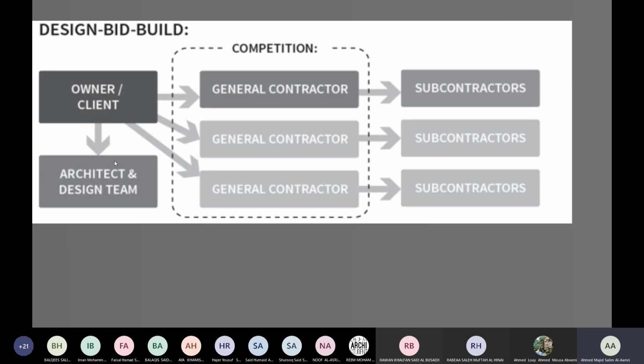The other person. So if I say I have signed an agreement for 50,000, I'm going to pay only 50,000. Whatever happens in the materials, whether the prices are going up or down, it's not my relationship. Whatever happens after the agreement is going to go to the contractor's side. He is the responsible person. I have an agreement that for 50,000 Omani riyals, you need to build me my villa. I will not give you a single extra riyal. Are we clear?